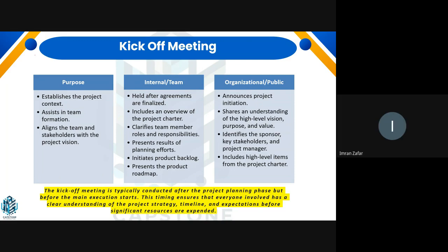So, the kickoff meeting is normally done when we have all the plans ready and we are ready for the execution. Before starting the execution, we do the kickoff meeting, so everyone is aligned and has a clear understanding of what we are trying to achieve, what our scope is, and who will be responsible for what. This is usually to align all our stakeholders, including our team and our sponsor, towards the project mission, whatever we are trying to achieve.